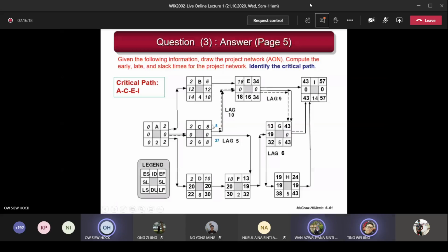Coming backward, you take the smaller. Same if you go forward and there's a merge, you put all three. Here I didn't put the 34, the 43, and the 24, then you compare and put the 43. You understand? Thank you, Doctor. Not necessarily. As long as you don't make a mistake in calculation. Any more questions?